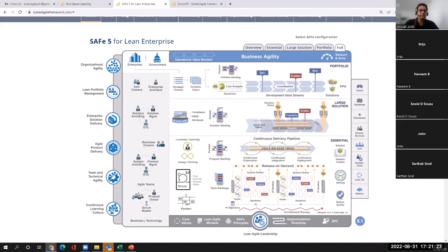And for staying close to the customers, we have a dual operating system in SAFe, where we have hierarchies of functional managers for stability and execution, but we organize around a virtual network of teams. So that's what we are trying to understand now, how people are organized in SAFe. The basic building block of this organization is agile teams. Agile teams are 5 to 11 team members, including Scrum Master and Product Owner, which are two specialized roles.